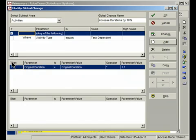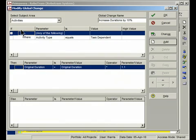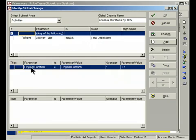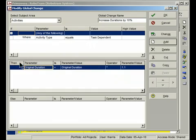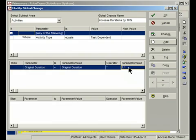If, Then, Else. And in the first section, this is where I'm selecting the types of activities that I want to make a change to. So this says if the activity type is task dependent. So I only want to change those activity types that are task dependent. Then, down here in the Then section, Original Duration equals the same original duration but multiplied by 1.1. So that's a little formula that will actually increase the value of the original duration by 10% when I run this Global Change.